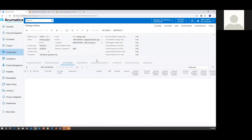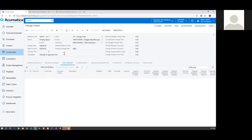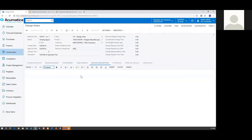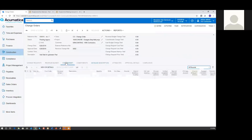I've created this change order — I'm going to click on it for this particular webinar. This is a change order to add that slab for the generator pad. So we had the project issue, turned into an RFI, turned into a change request, and now we've got the actual change order. This is what's going to be sent out to perhaps the subcontractor or my labor crew in the field to perform the task of adding a slab for the generator pad. On a change order — same as the change request — we've got header information at the top and detailed information below. Right now I have no revenue or cost budget, commitments, or descriptions associated with this change order. I could manually add those line items, or pull them in from a change request, which is what we're going to do.